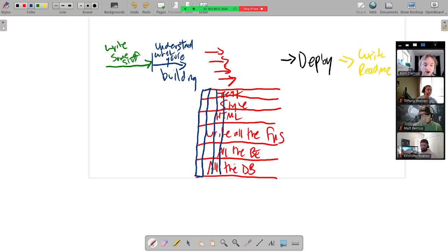And so now we haven't started a bunch of work on that. We've finished something, which is fast. Now that we've finished something, we have the flexibility to figure out what the next thing we want to start is. If we start everything at the beginning, it doesn't change how fast we can finish things, but it does take some choices away from us. And those are very handy choices to have.